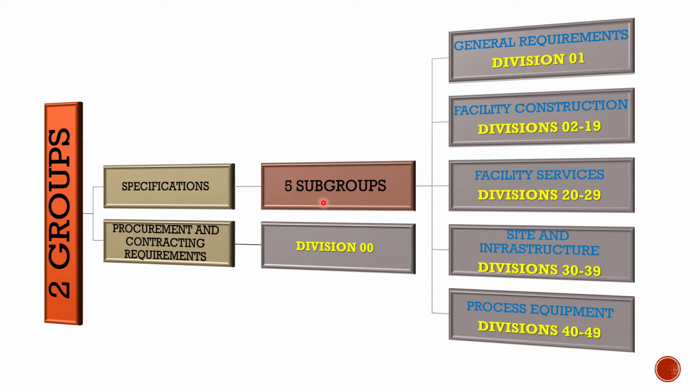So hopefully at the end of this, you'll know division 3 is concrete. It doesn't change no matter what project you are on, no matter what format it is, old version or new version, typically division 3 is concrete. So if I need to know about concrete, I go to division 3. This is how it's organized.